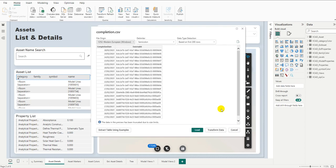So let's go ahead and let's load our completion CSV and let's have a quick look. So here it is. All we simply need is a column with a completion date telling us which date an item was built on and the external ID to identify that item. Let's go ahead and load it.